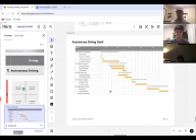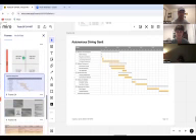The longest part is going to be the deployment and scaling because there's going to be at least a year, year and a half pilot program of introducing it into few cars and few areas and getting results from that. And then the gradual expansion is actually going to be, you can't see it on this chart, but at least 2 years to really scale it out and start putting it in other places, not just wherever they had the pilot program.